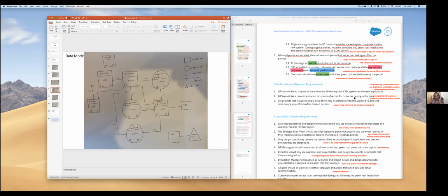But by the time you are in the position to load your data to the production, you need to make sure that you have already done the dry run. You know how much time it is going to take, so that you can do the planning, right? Because if you have uploaded a full-size data set in the staging environment, you would have already known how much time it is going to take. So if it just takes 1 hour, then yes, you can do it 1 day before. But if it takes 2 weeks, then you cannot do it just before your production day. So all this optimization exercise and planning exercise needs to happen before. And that's why we are doing the dry test load run, which will help me plan all these things.